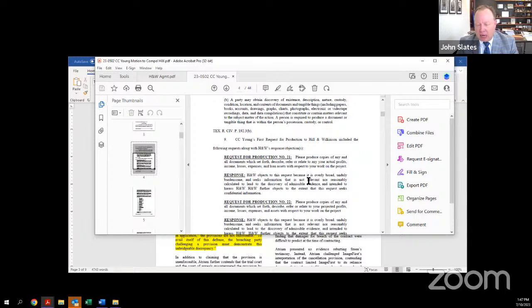First of all, as I said, the contract provides that it is a fixed non-auditable rate. But in addition to that, during construction, we had change orders, and some of those change orders had general conditions costs in them. And this is what they're referring to as a liquidated damage. And during the project, the owner asked for substantiation of what those costs were. And we provided it. A gentleman named Rich Townsend, who's an auditor in the construction industry, was working for the owner at the time, and he received and reviewed that documentation over the course of the project.